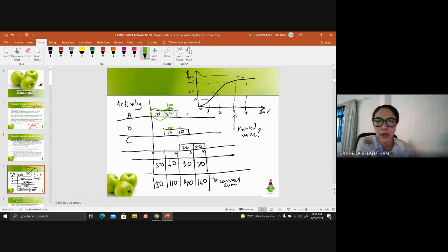In terms of cost, you can change it as such. Let's say on the site it is not 50, it is 100. So this is where you change your number and it will reflect whether your graph lies here or here. If there are changes as such, 100, 50, 20 over 10, there will be deviation in your S-curve, the actual S-curve too.